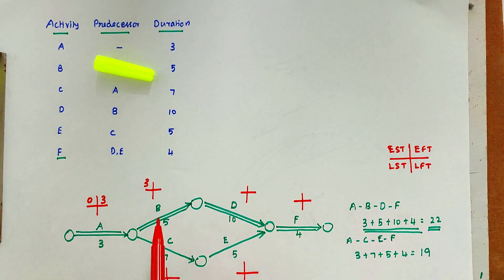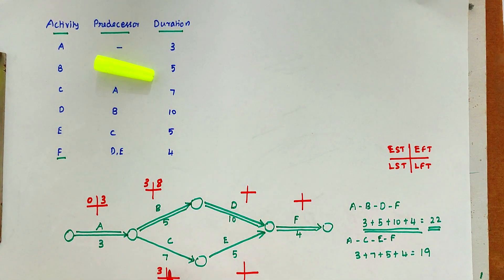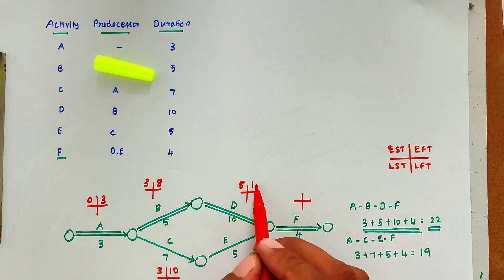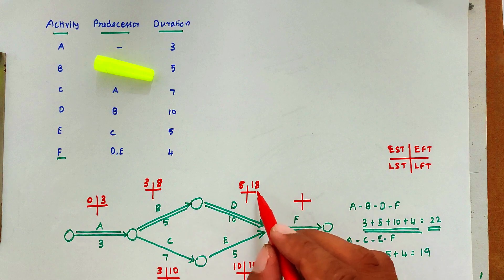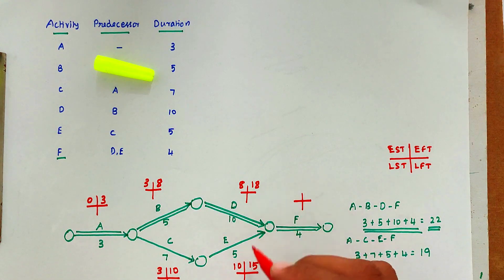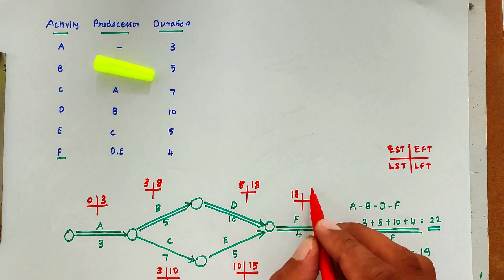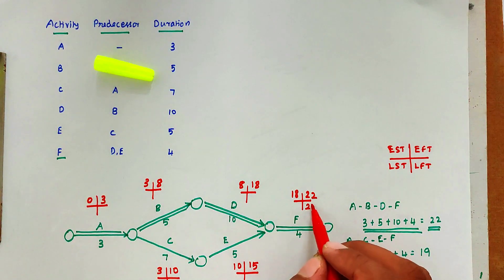We place 3 at the end of A. Then for the forward pass: 3 + 5 = 8 for path through B, and 3 + 7 = 10 for path through C. We place 8 after B. Then 8 + 10 = 18 for D, and 10 + 5 = 15 for E. We take the maximum value from both EFTs, which is 18. So 18 + 4 = 22 for F.